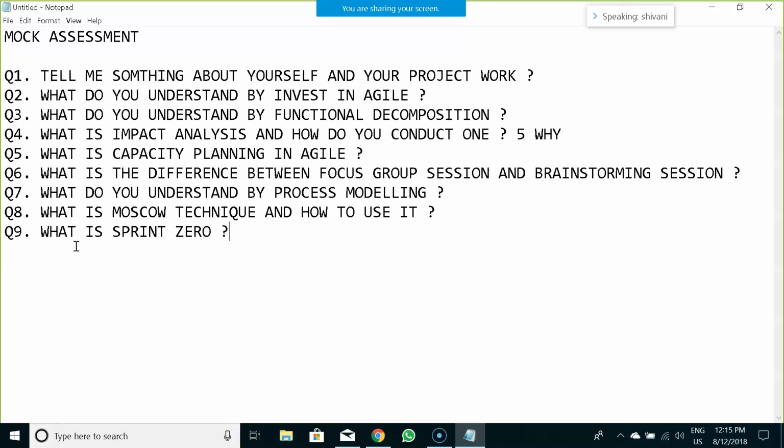Okay. Don't you think before starting with development, the infrastructure needs to be set up for the development team and it should take minimum 1 to 2 weeks? Yeah, it should. So something would go in sprint 0. The rest all would start from sprint 1. Okay.